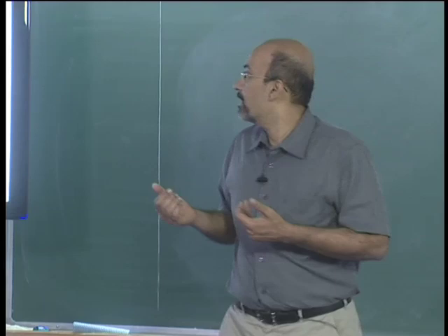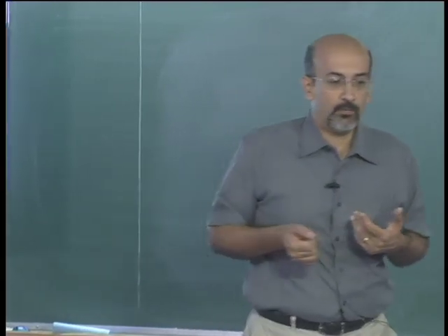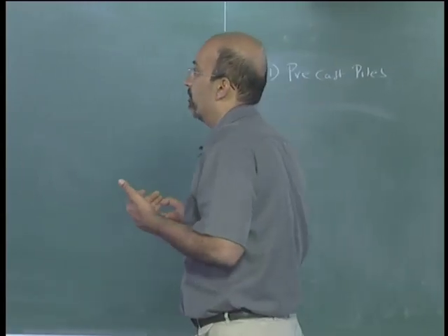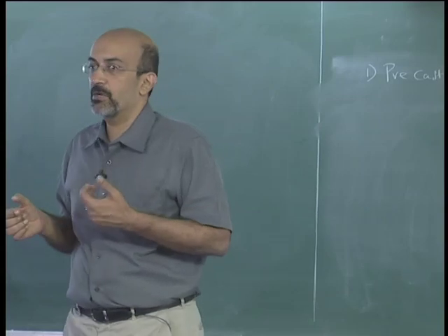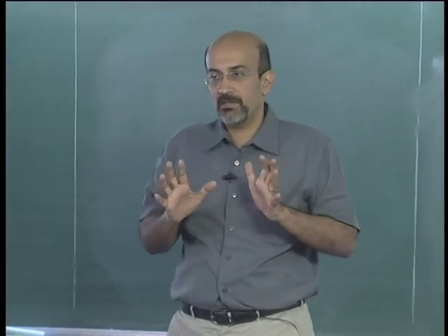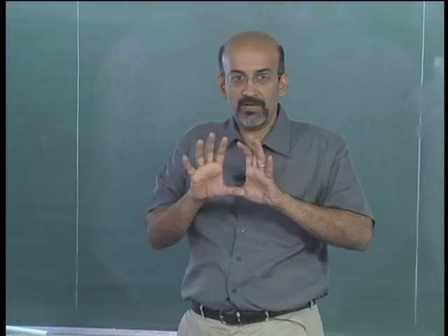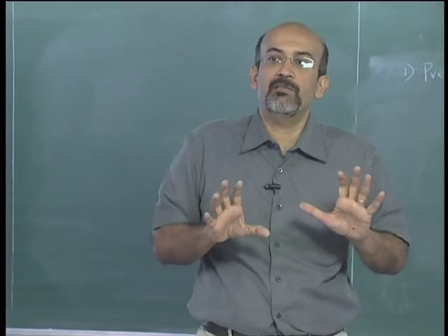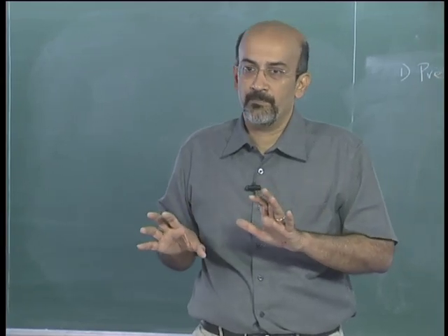The second question: what activities should be considered? Like we have said, the WBS should be comprehensive. There should be no gaps in the job logic. Logic doesn't necessarily mean sequence. It means that once I have completed all the elements of the WBS, my job should be fully complete. All activities of my job should be accounted for.